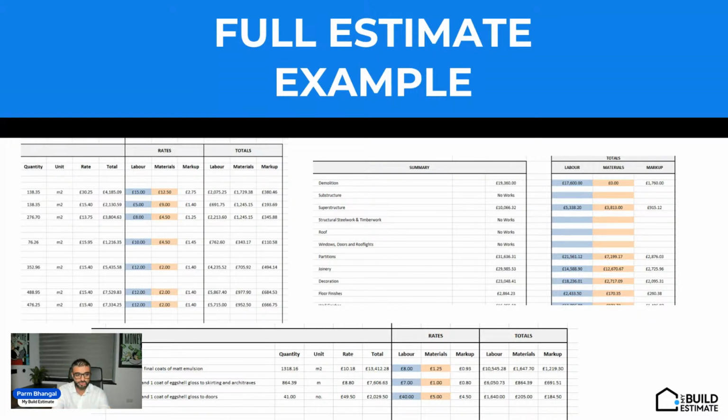Now, when you look at getting into cost control, just with that piece of information in those 3 columns, you know what your labour is. When you're negotiating with subcontractors, you can say, well, I've got 10.5 grand here for my decorators. You know what you need to bring them in at to be able to make a profit. If you beat that number, you know you'll make more profit. If you don't beat that number and you get it for that number, you'll know you're making markup. With your materials, you can see exactly what allocation you've got in there for material. When you're buying, that's your budget. So you will get this document from us as standard when you do a full estimate.